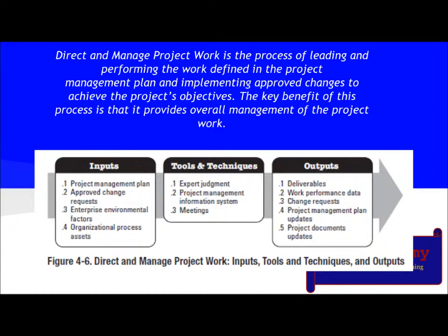The inputs involved are project management plan, approved change request, enterprise environmental factors, organizational process asset. The tools and techniques are expert judgment, project management information system, meetings, and outputs are deliverables, work performance data, change request, project management plan updates, and project document updates.